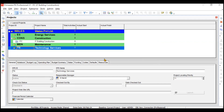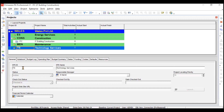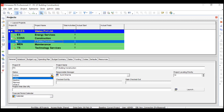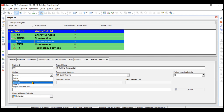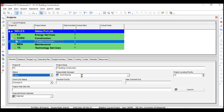We'll also look at the Detail view. In the General tab you can change the EPS, EPS ID, EPS name, responsible manager, and project status. For example, if it's COVID time and the project has stopped, you can set it as Inactive. You can also set it as Planned - if it's not an actual project - or as a What-If scenario for calculations. Project priority is useful when you have several projects; higher priority projects are treated as more critical.